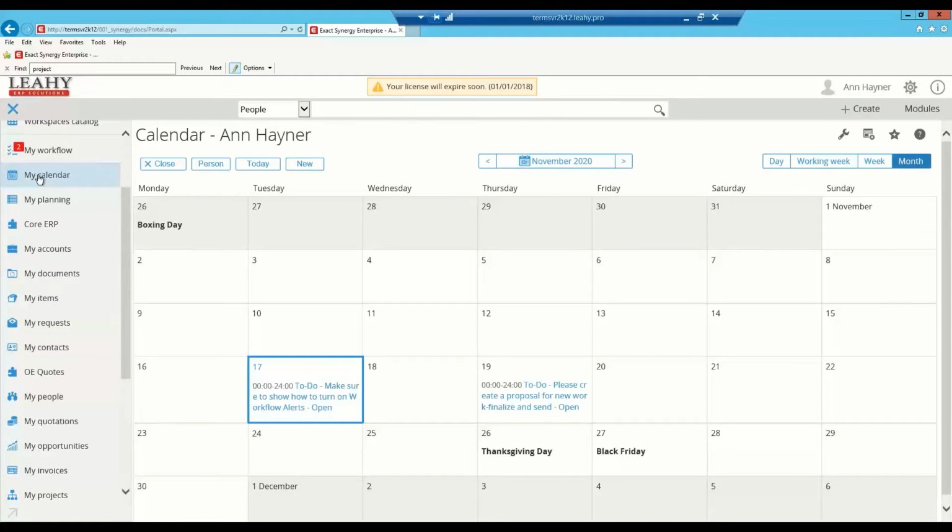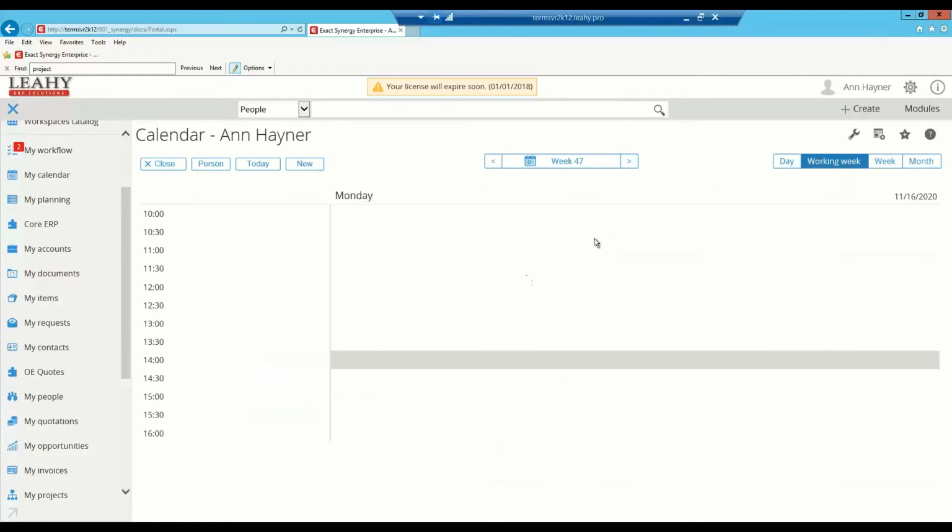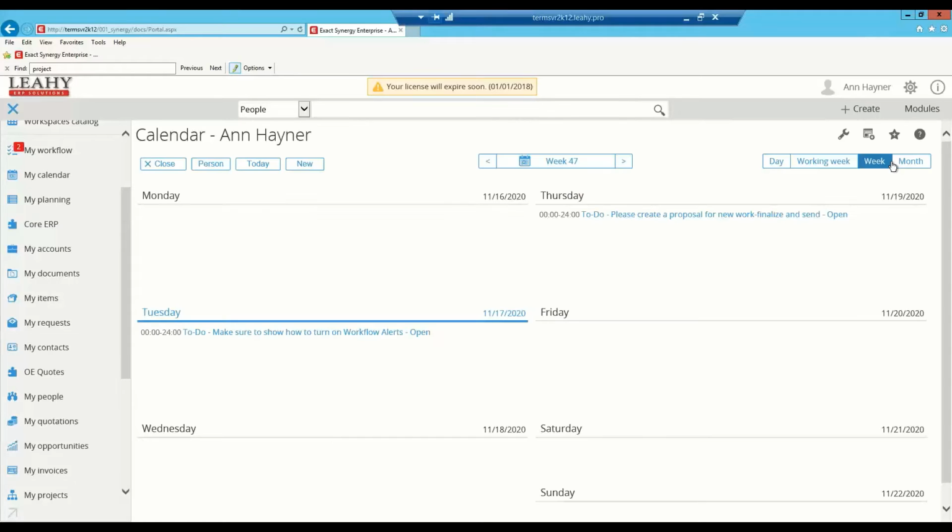One reads certain kinds of requests that you define, and that's this calendar, which has multiple formats that you can look at: week, working week, day, just like you'd expect, kind of like Outlook, right? The only way that things show up, though, on calendars by date is if you've actually attached starting and ending times to things, not just hourly estimates, but starting and ending times. Otherwise, it just puts it up at the top of the day.